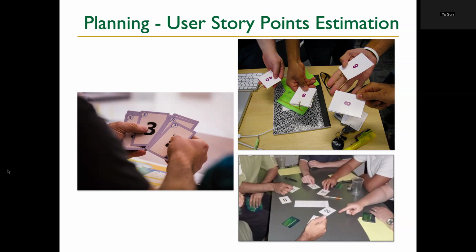Maybe the people who showed 8 hours didn't know the right way to do it or a shortcut, or maybe the ones who showed 1 hour underestimated certain challenges, right? So then we discuss: you tell me why you think this needs longer, you tell me why it needs less, and then we reach a reasonable conclusion at the end. So this approach looks simple, but it's very effective. It solves a lot of problems. But every task has to have a dedicated, agreed estimate number.